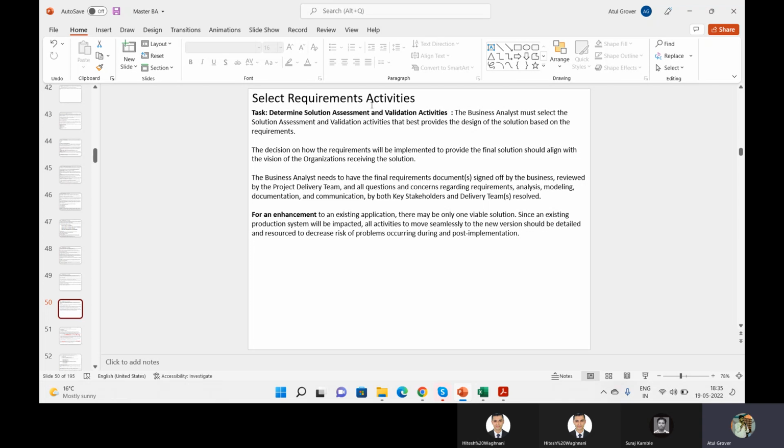So that they should not blame me later, saying, hey, you did not chase me. It's done and dusted. And we had already informed in our BRP meetings that it is the responsibility of the value stream team. If anything is sent by the product team, they have to respond back with the requirements or clarifications. If they do not provide the clarification, the product team has full rights to take those stories out of the sprint.